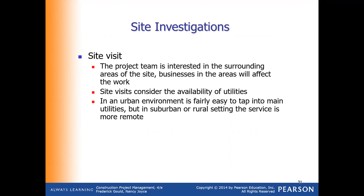Also during the site visit, we need to be on the lookout for the surrounding area. If the project is near a school — public or private — then the traffic will change, and if you have deliveries, you need a spot outside to work out the traffic.